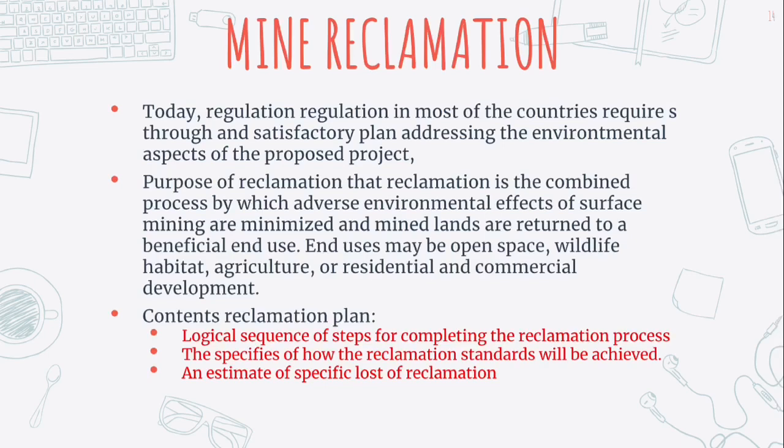The contents of a reclamation plan: first, a logical sequence of steps for completing the reclamation process. Second, the specifics of how the reclamation standards will be achieved. Third, an estimate of the specific cost of reclamation.